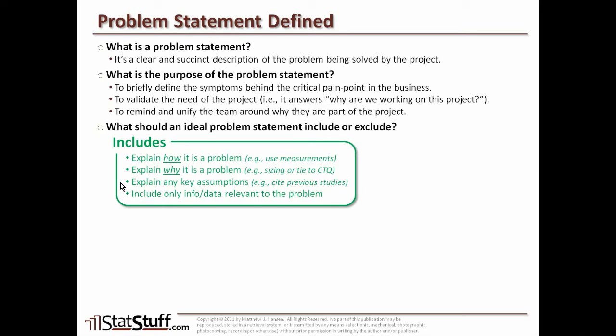We also want to explain any key assumptions that might be made within the project, or at least key assumptions we might have in defining this problem statement. If there's something like a benchmark or a previous study that's been done and we're using that to help explain why we think it's a problem, then state it as such. However, if there are just some general assumptions, those should not be stated in the problem statement. But if there's anything critical that helps define part of why we think it's a problem, we should identify that and make sure we label it as an assumption. Finally, include any relevant information around the problem — only stuff that's really critical for context around the pain point we're trying to define.